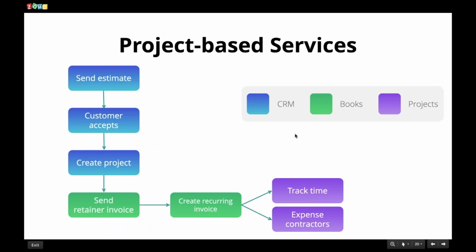If you wanted to, you could go crazy enough to actually do the time tracking for every single task in your Zoho Projects project and then send out an invoice for all of that using that finance thing I was showing you. But for most companies, I think it'll be much simpler to do time tracking for your own records, but then when it comes to invoicing your client, to just do it in installments like that, and maybe to set it up so they're paying 20% upfront and then just paying a percentage chunk at a time for the rest of the duration of the project after that.